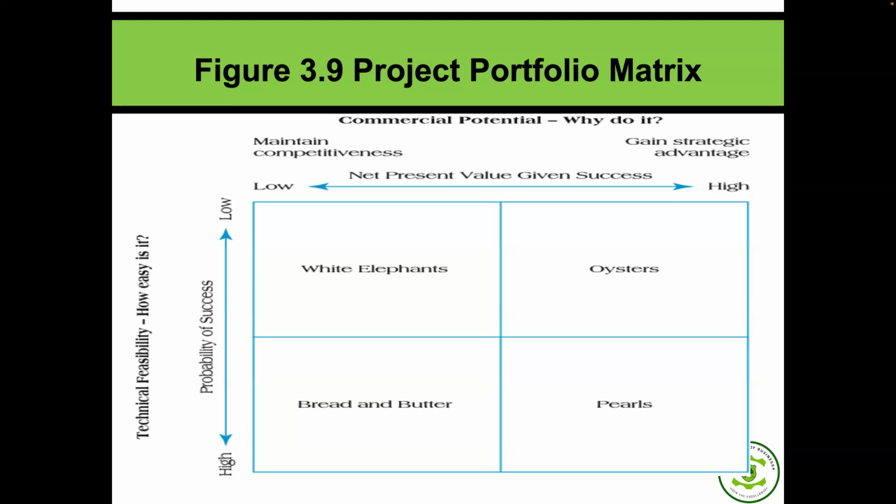So we will not wait until the project is implemented and becomes unsuccessful, and then say that the project is a white elephant. Even as part of our portfolio management, we'll say that, look, the nature of this project, commercial viability is very, very low. Probability of success is very low. So if we embark on this project, it is going to be a drain on other projects that the organization is already managing. The portfolio will be severely affected because of what? This white elephant.